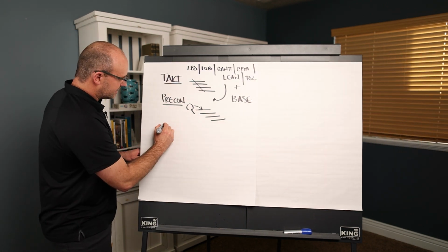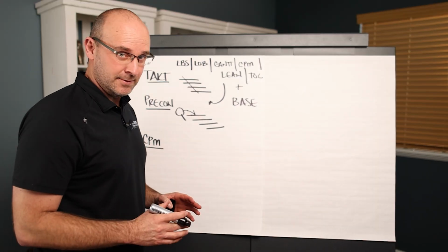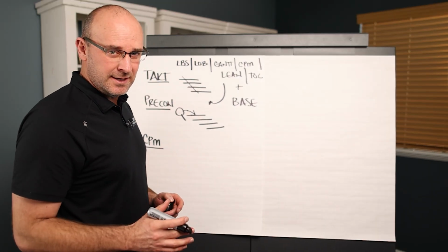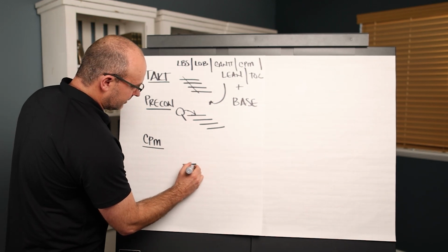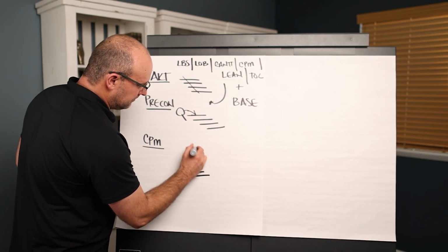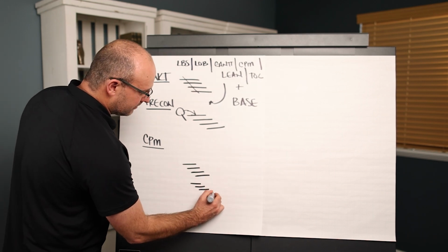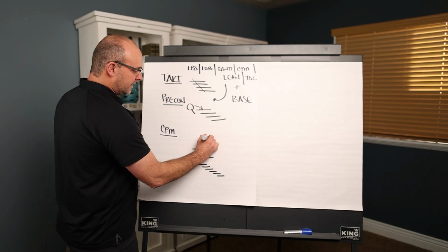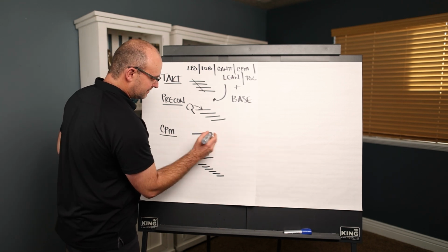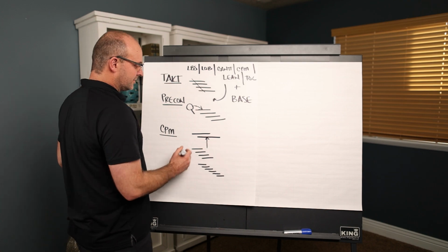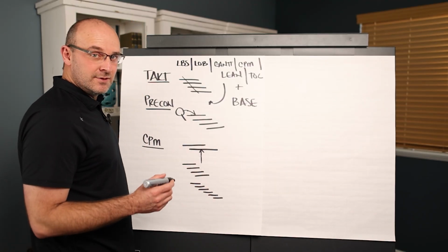Okay, now how does CPM tie into these systems? Well, if you can't get rid of CPM, and if we can't kill it, and if it has to be your contract schedule, then here's exactly what I'm asking you to do. You'll have your Takt plan, and you can have multiple phases. Here, I'll start drawing it with multiple phases. Maybe that multiple phase comes out a little bit. CPM can be your level 1, level 2, and I know what you're thinking. You're gonna ask me for a level 3 here, and I'm going to start to complain and cry and whine and moan, but I'd rather you keep it at a level 2 level of detail.